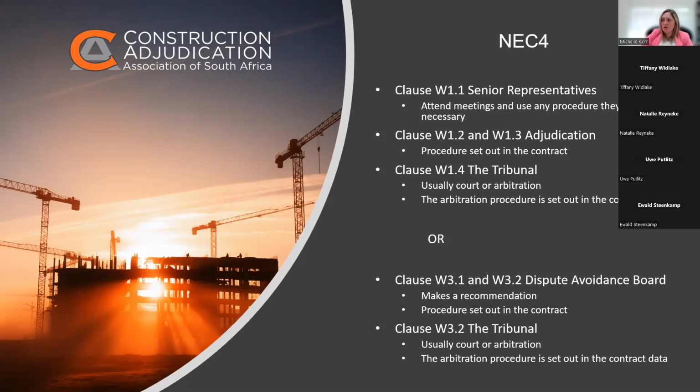What that does, though, is that it removes that additional layer that usually a contractor would have in place, where they have a binding adjudicator's decision that they can enforce and that they sit with the money unless or until it's overturned by arbitration. Whereas under this option W3, they don't have the advantage of getting that temporarily binding decision. The recommendation is not binding. The recommendation is not going to allow them to enforce payment and sit with the money while the arbitrator, the tribunal, so usually arbitration, is going on and a final decision is being made.